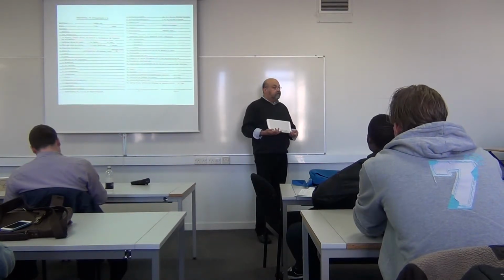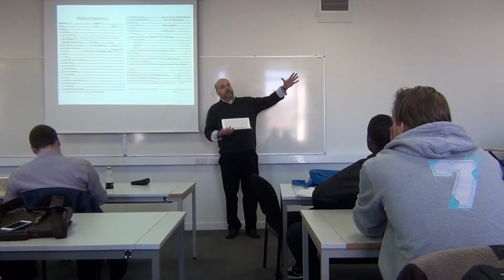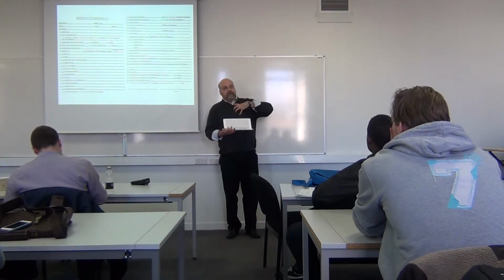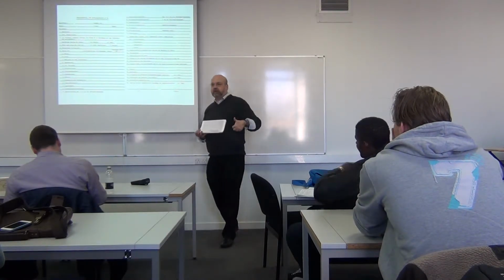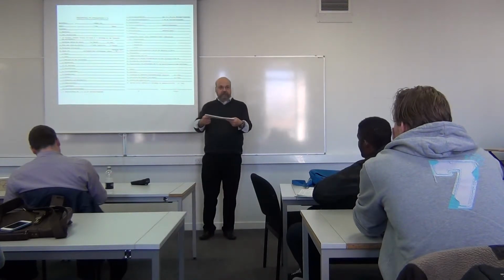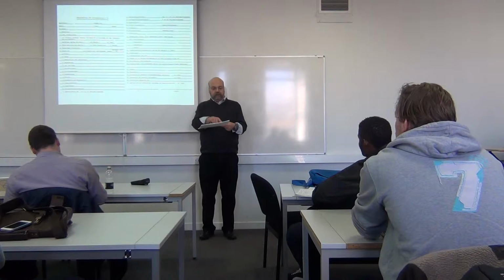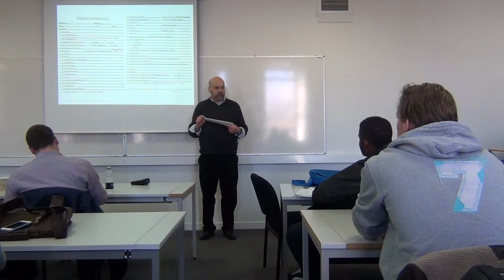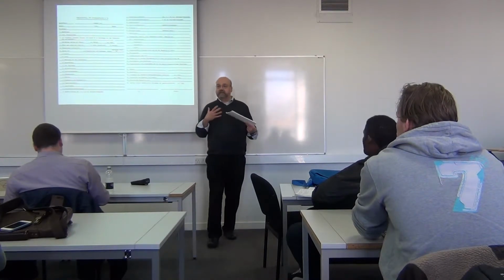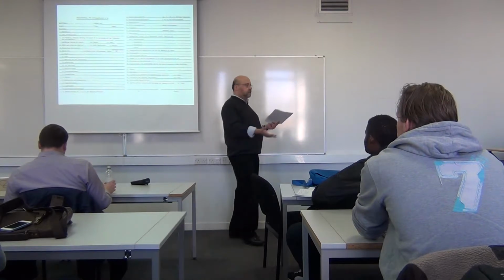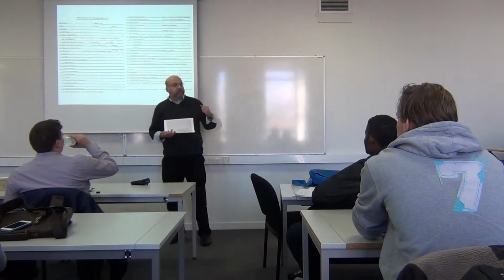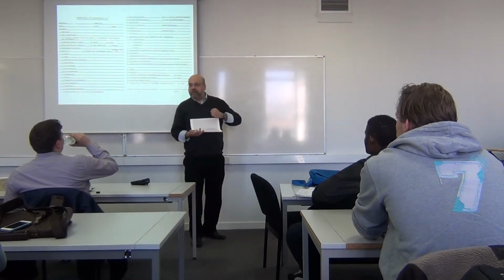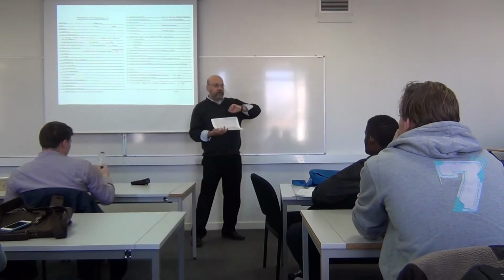Or even if there are additional works which are not in the contract, I, as a main contractor, or even the client side, would like to know how much a worker costs, because then he would submit to me a sheet with 2 workers, 15 hours. And then there is a price per hour, per unit. It makes a difference if this price per hour is 10 pounds or 11 or 12 pounds per hour, because it will sum up. In the end, it's quite a sum.